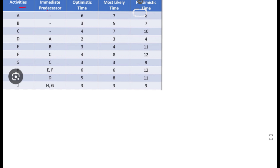PERT uses three time estimates: optimistic time, most likely time, and pessimistic time. Optimistic time means everything is going very well as per plan. Most likely time is the normal estimate for the activity duration. Pessimistic time means everything is going wrong — any plan will entirely collapse due to some uncertainty.